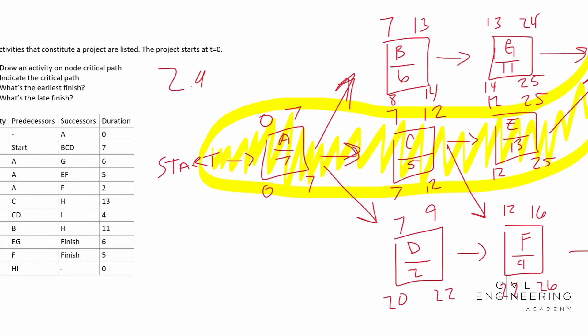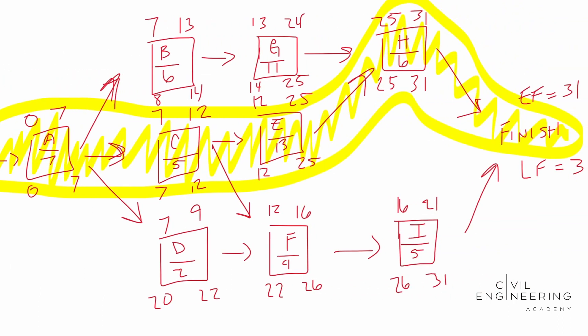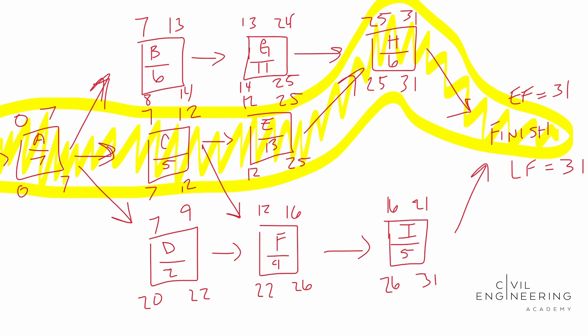And it wants us to know what's the earliest finish, the latest finish. We have it right there at 31. And then as far as float goes, here's a good lesson on float. Let's use F for example. If you're looking at F node F, the earliest that it can start is day 12. The latest it can start, day 22. So it has about a 10 day gap before it has to get started before it delays the project. That's going to be your float for this problem.